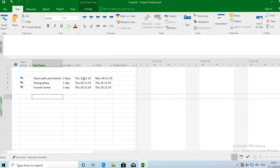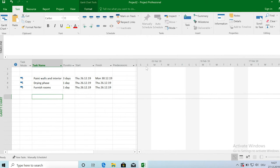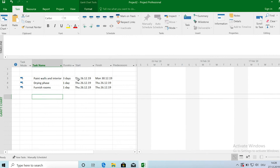So now the dates have again changed because as I said automatic scheduling means MS project is optimizing your project schedule for duration. So it starts right away. So today's the 27th of December and it starts, funny enough it starts yesterday. But you know it just starts right away and it makes sure that duration is minimized.